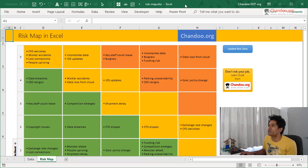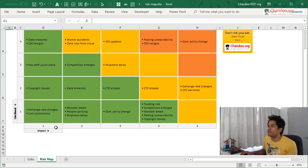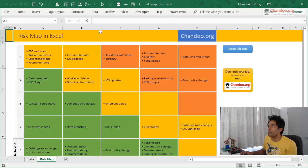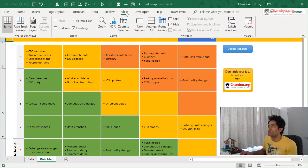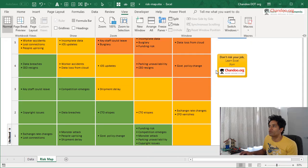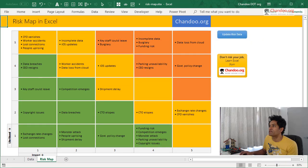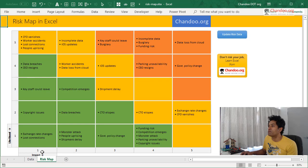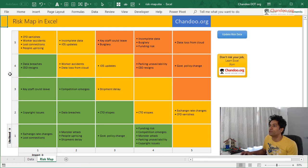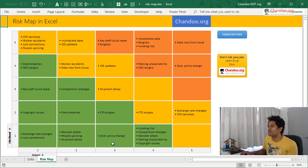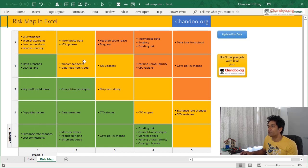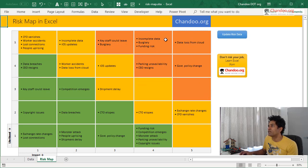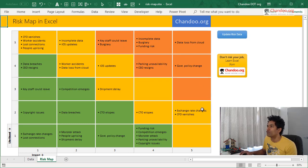So here is our risk map. As you could see, it shows a bunch of risks. I'm just going to quickly turn off headings and formula bar so we have some more space to see everything. Likelihood of risks are rated one to five and the impact is also one to five, and various risks color coded to show the green ones are probably the kind of risks that are low likelihood or low impact. And then you have your medium level ones, yellow ones, and then the highly risky ones, the ones that need to be taken care of. These are randomly made ones, but you could get an idea.